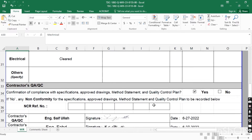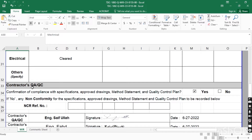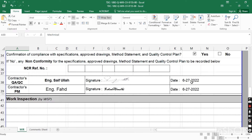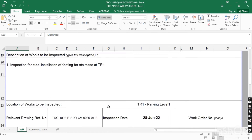The next part is contractor QC confirmation of compliance with specification, approved drawings, method statement, and quality control plan. If all work is as per specification, drawings, method statement, and quality control plan, you mark 'Yes'. If you mark 'No', it means there is an NCR — a non-conformance report. So mark 'Yes' here. If you have any NCR relevant to the drawing, put it here. Then write your QC name, sign the WIR, put the date, and the contractor's PM also signs and puts the date.